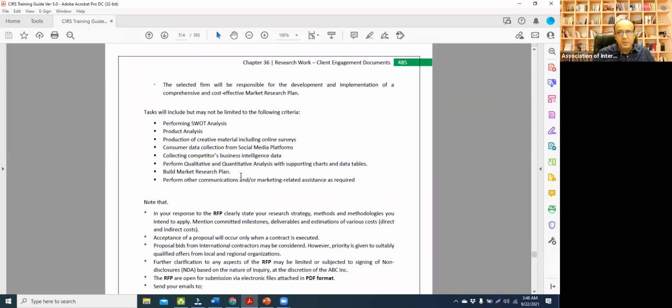One is the scope, which has to be really well written, and detailed enough that when you put it in your proposal, you are able to tell if this is the fixed sort of work for which you can assess the price with confidence. And there could be other elements which would require different costing.